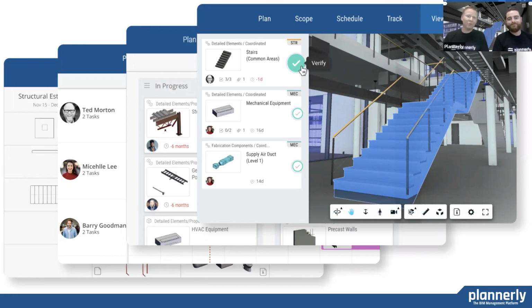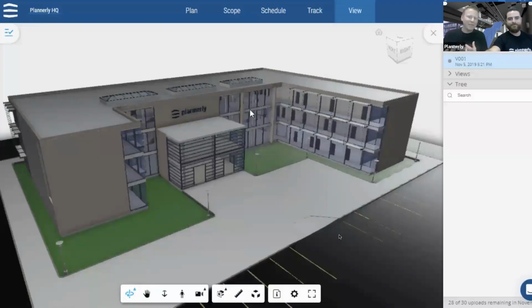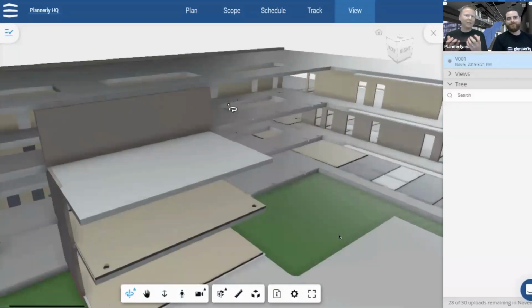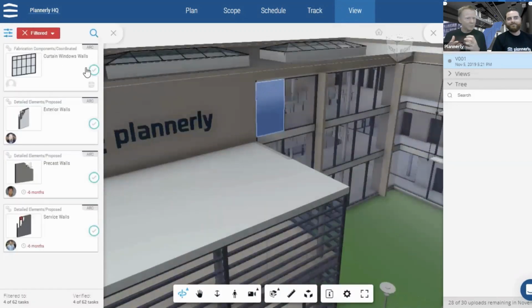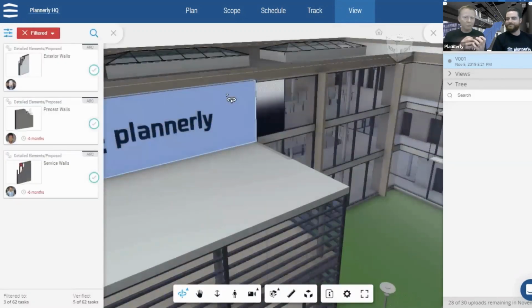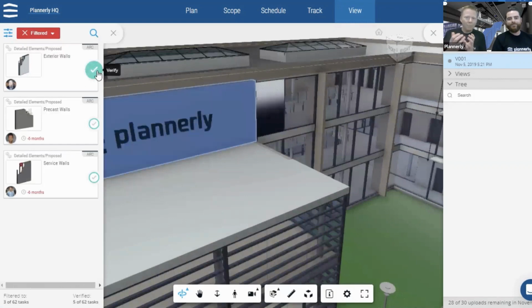Yep. If you start using a model before you have checked that it is ready for that purpose, you could potentially suffer a huge amount of rework, a huge amount of waste. We sat in a lot of coordination meetings in our past where we say, hey, this is a problem because two people have modeled the same thing, or potentially where there's a missing scope, and you end up not having the right deliverables, and you end up finding the problems when you're using the analysis process rather than making sure those deliverables are ready for whatever that BIM use is, that model purpose.